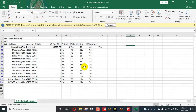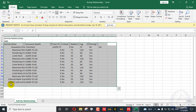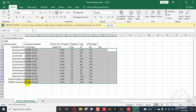The maximum allowable lag is up to five days, and the maximum allowable lead is also five days. However, in some projects and planning management systems, companies allow seven or ten days. It depends on your activity, job description, and what your contract allows. You can check your lag by extracting from the Report Wizard — that report will contain lag values and show activities with excess lag.